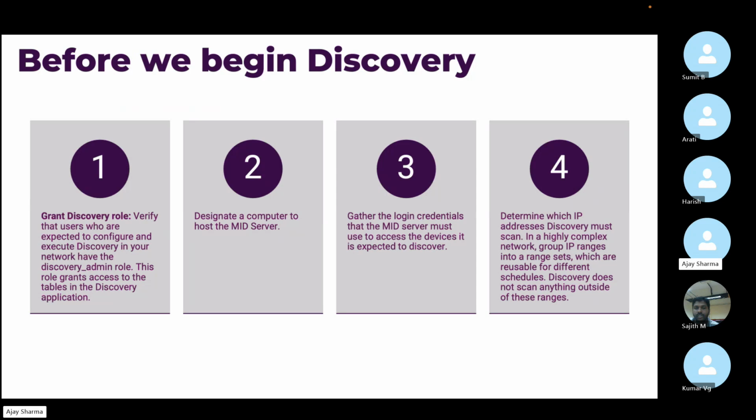First of all, the first thing to ask from your project manager or your management, or whoever is reaching out to involve you in that particular project, is the SOW. SOW is the scope of work. In the SOW, you will get the information about what you exactly need to do, as a developer or an architect or a business process consultant. Just saying discovery is needed or CMDB is needed will not justify it, because CMDB and Discovery have lots of things. So we need to understand from our project manager or the management what exactly we need to do, and what the scope of work is.